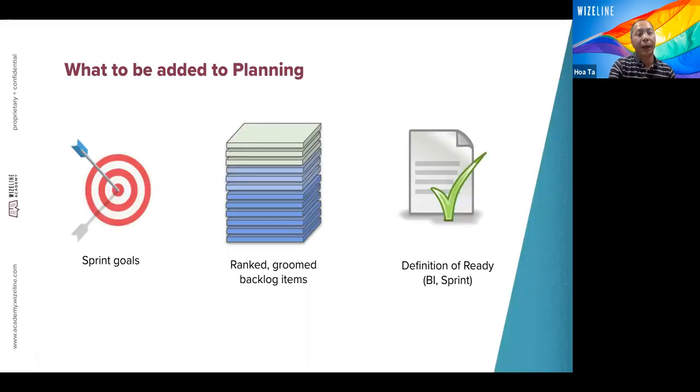And what needs to be added into this planning? Before going to the sprint planning, the very important thing is that we need to define the goals of the sprint. We cannot plan for something that we are not sure about. We expect that this sprint, that group of features will be done. So we plan toward that.